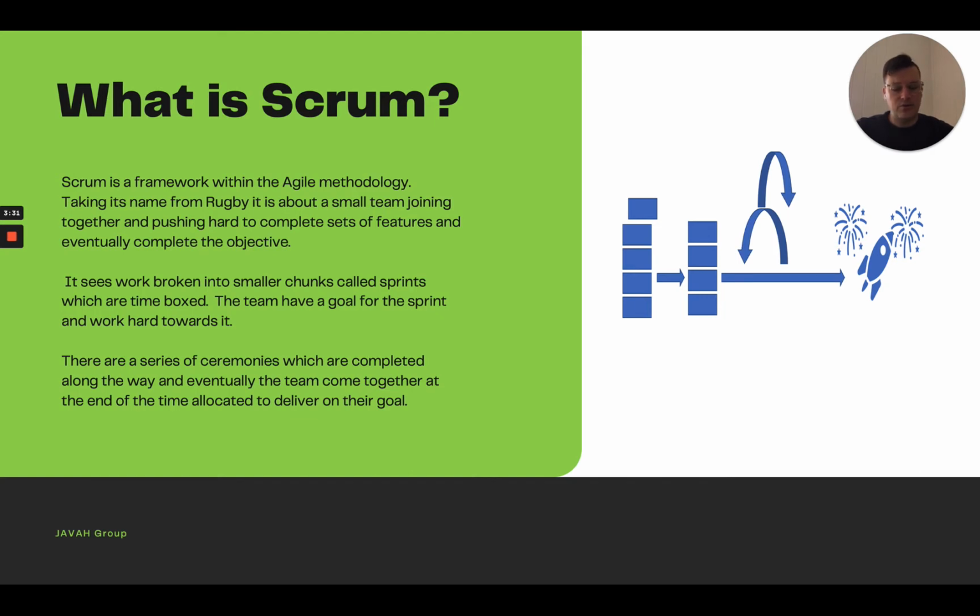There's a number of steps that occur there. You'll be doing things like estimations or backlog refinement, perhaps, being able to understand what's coming next and how that's all looking, where the change of value is within the business. You'll be doing daily stand-ups quite often. And then as you roll towards the end, you'll be looking at things like showcasing. You'll be looking at things like your retrospectives, where you sit down and have a no-blame post-mortem.